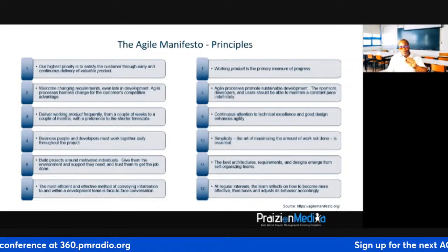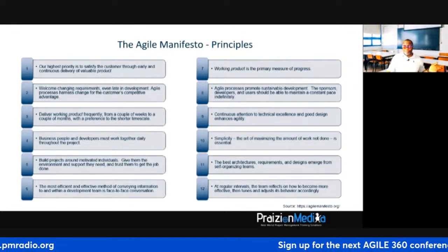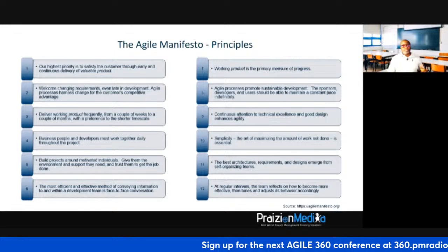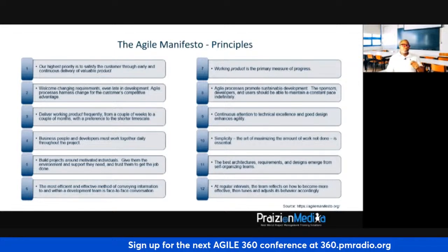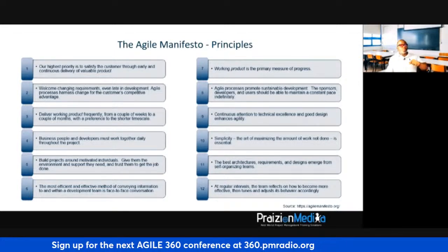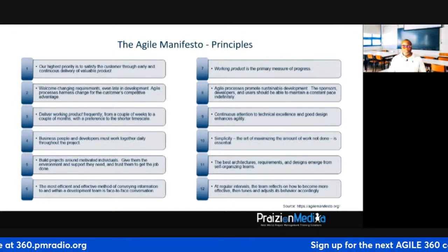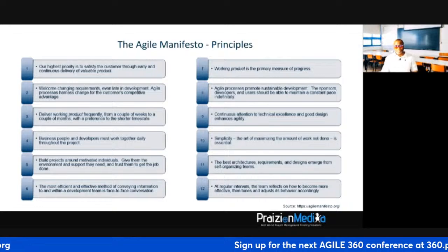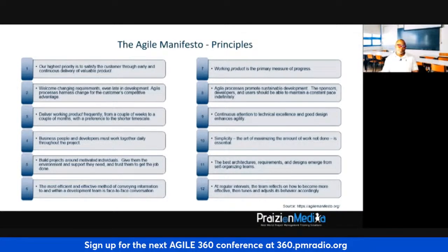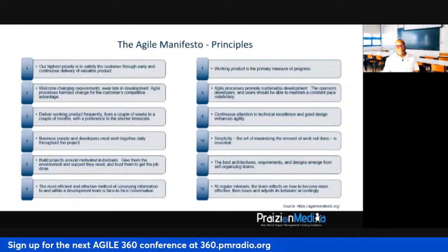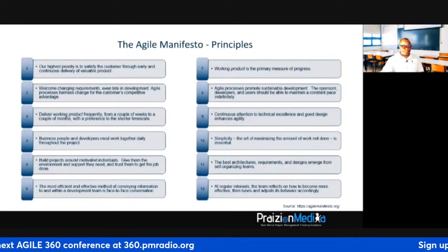So you look for one or two, or maybe more items that are discovered that you can improve on. Well, those could become backlog items for you to work on for the next sprint. And in the next sprint, you take account. These things we were working on, did we really get better in our process? Did we improve? Questions like that. So it's more like an unspoken retrospective. Does that make sense? Yeah.